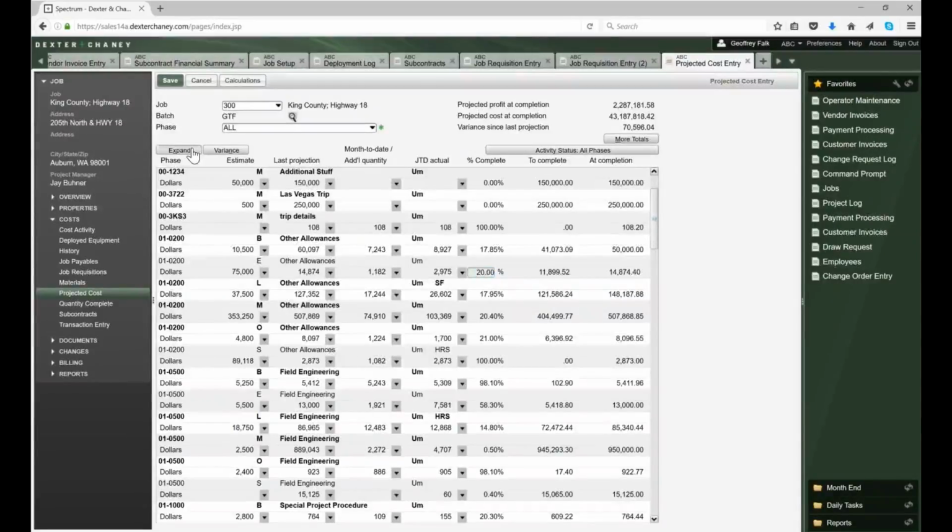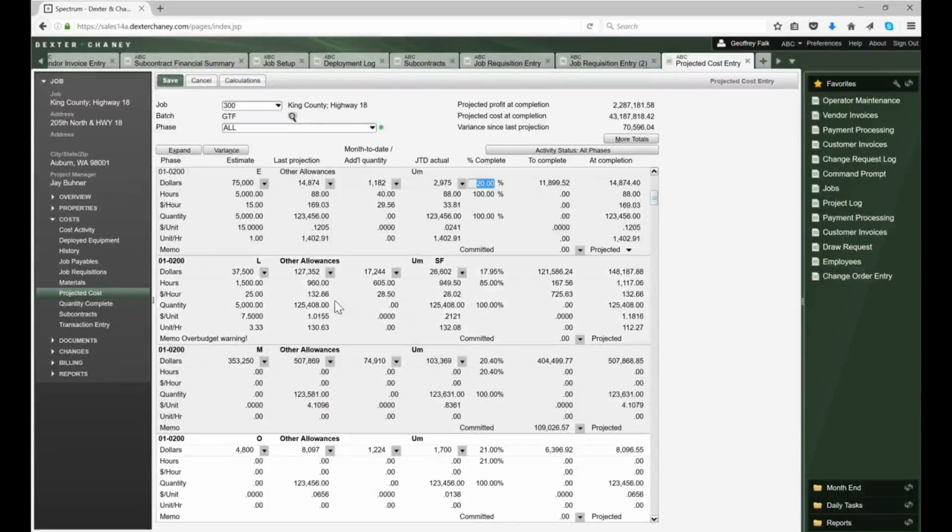Now, this expanded version of it is for the scenario where you want to track the hours, the dollars per hour, any quantities per unit, units per hour. The idea here is that if you make a change, say the hours, I say I'm 85% done with these hours. Well, if I said, no, I'm really only 74% done, notice it recalculates all of my math. I can also say that my dollar per hour is not $430.49, it's really 65 bucks an hour. And so it recalculates everything based on that value.